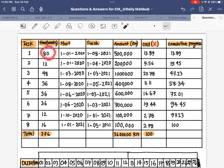To convert weeks to months: 80 weeks divided by 4 — since one month equals four weeks — gives 20 months. When I add 20 months to the start date, I get 1st August 2021. In the same way I will find the finishing date for each activity.